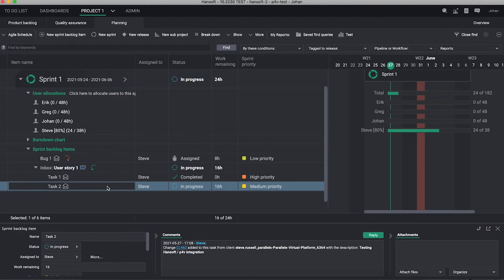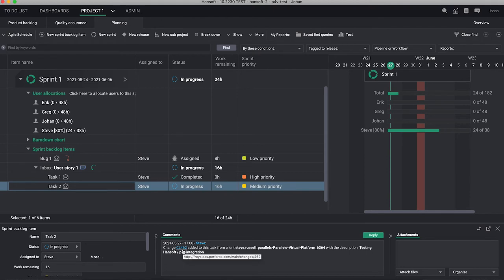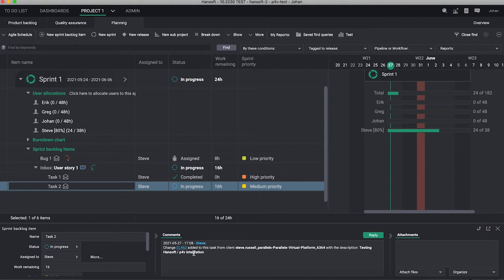If we're looking at Steve right now, he's got a couple of different tasks. This one is now in progress, he's already done with one task, he got 16 hours left. And we can see that so far he has added change 462 from this workspace and this was the description that that change list had.